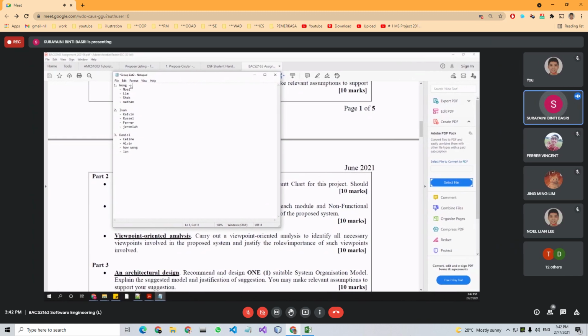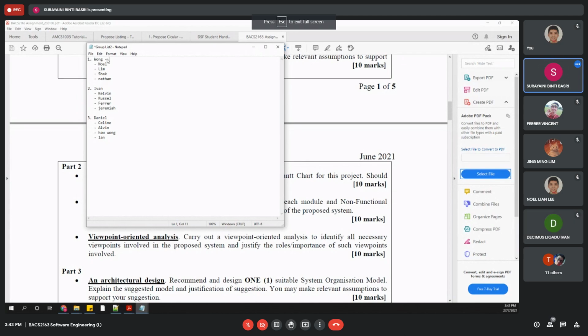But for waterfall, maybe it is based on stage, so later you will know what cost each phase has. For those who don't understand what I'm saying now, maybe you will understand after you have finished watching that video, because that video shows the summary of the cost for every module, or each of the phases in your process or your activity.